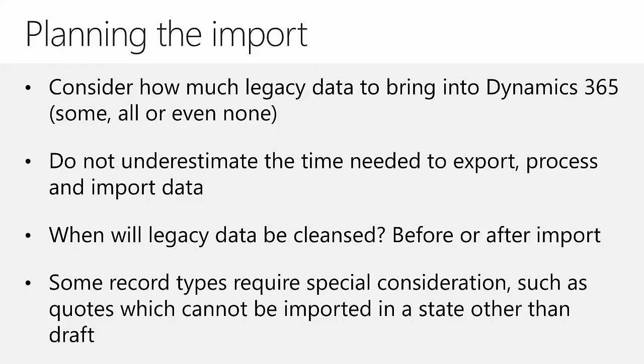The time to import data not only includes getting the data into the right format for import, but also the time it takes to actually import the data. For very large data sets, it can literally take days for the data to be imported.